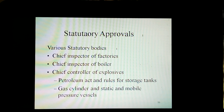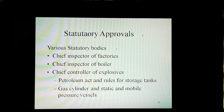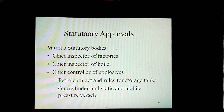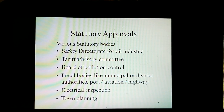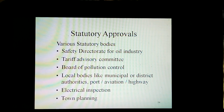Statutory approvals are required from various statutory bodies like Chief Inspector of Factories, Chief Inspector of Boilers, Chief Controller of Explosives, Petroleum Act rules for storage tanks, gas cylinder and static and motor pressure vessels. Also required from Safety Directorate for Oil Industry, Tariff Advisory Committee, Board of Pollution Control, local bodies like Municipal or District Authorities, Port and Aviation or Highway authorities, Electrical Inspection, and Town Planning.